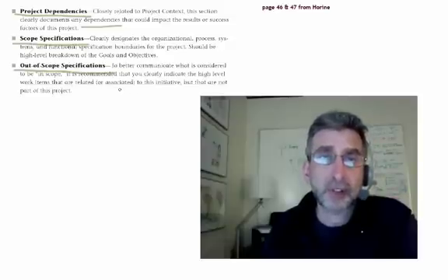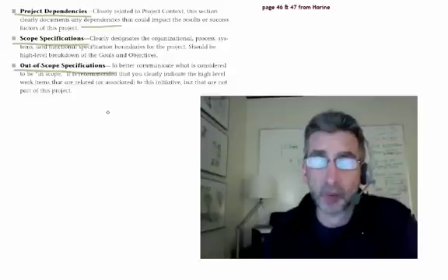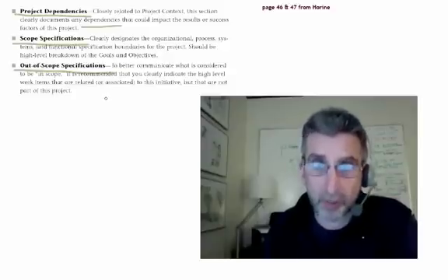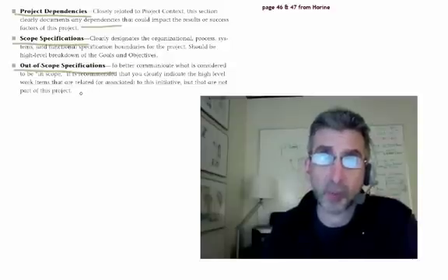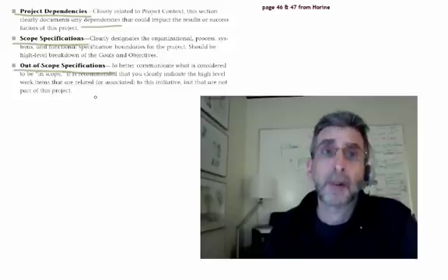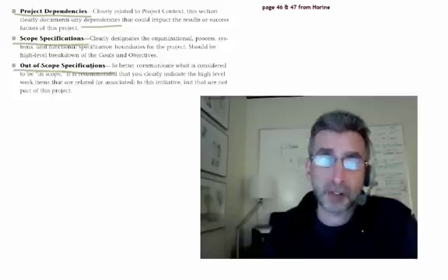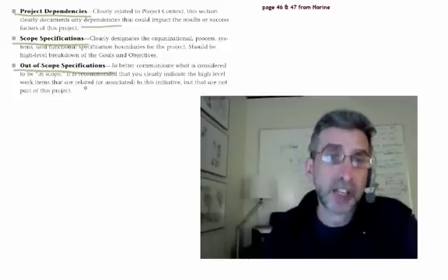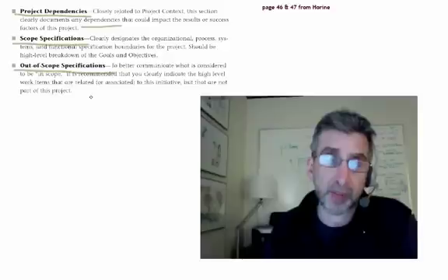Now, these kinds of scope specifications are very important when you're working with clients. So they know what you expect to do, and more importantly, what is out of scope. So if the client introduces a new idea, a new request, if it's outside of the scope, not within it, then you could say, that's not within the scope as we specified in the project plan, in the definition, so we have to change the plan or the project to accommodate it.